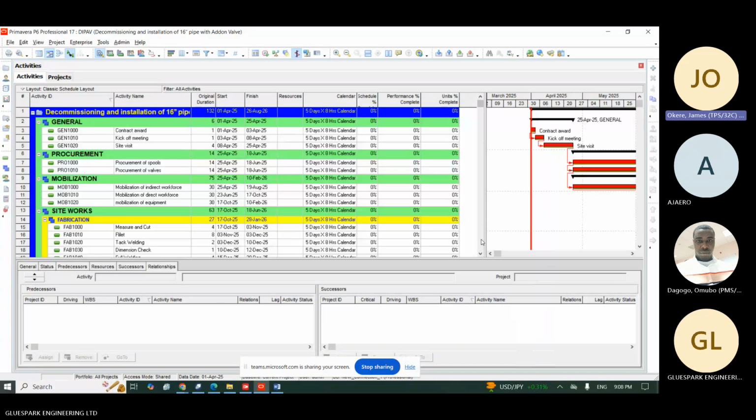He can lay more than that, but we say the minimum is 75, which means if I have 150 blocks to lay, right? I have a lot of options. One of the options can be to employ one mason to lay it for 2 days. The second option can be to employ 2 masons and lay it in 1 day.